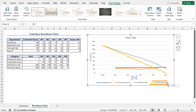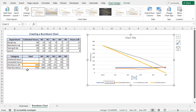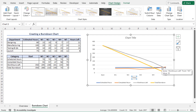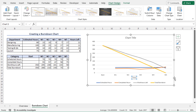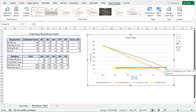In this chart, the total burndown is represented by the yellow line and the work hours left amount is represented by the ash color line. At the beginning of the project, the total work hours left and the total burndown amount are equal at 350. Since the work hours left line is showing up over the total burndown line, the team is behind the deadline. The burndown line intercepts the x-axis at the end of the fifth week, meaning all work should be completed by then. However, the work hours left line is not equal to zero at the estimated deadline, so there is still work yet to be done and the project will take longer than the planned five weeks.